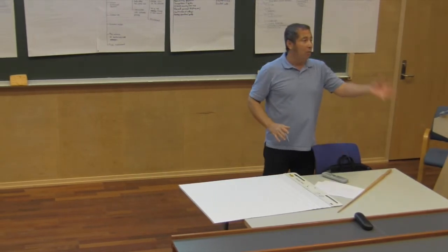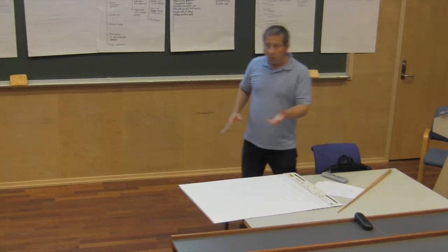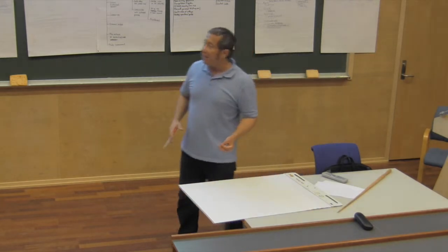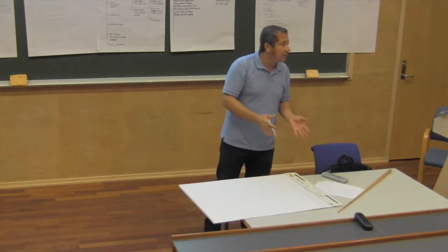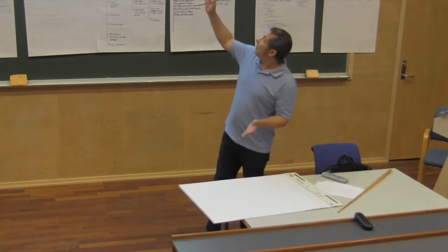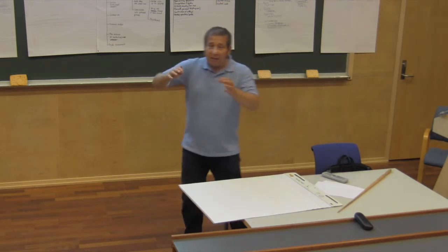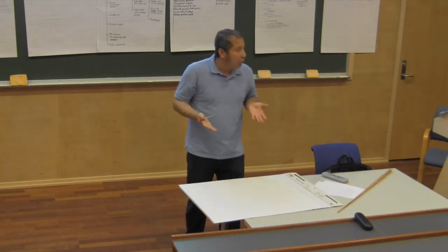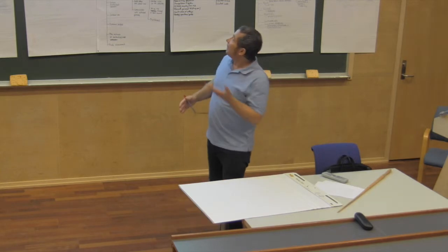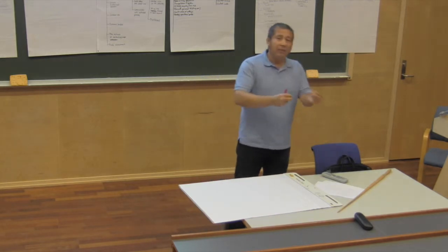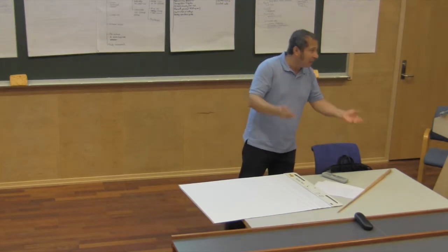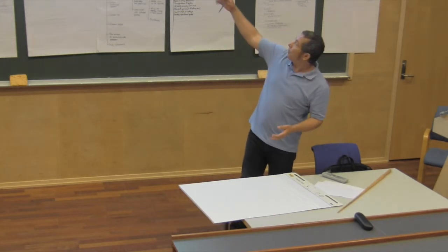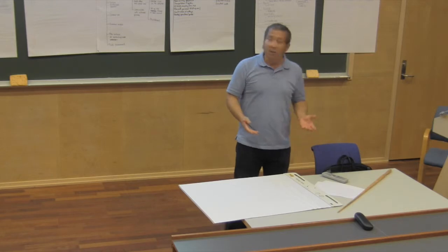They selected Tromsø Airport as a test base, and they said, okay, how can we test this pilot? Number one, you implement that IT system. You put it into operation, and then you verify the solution. Did it work? Which means you make an evaluation. And of course, adjustment to the chosen solution.